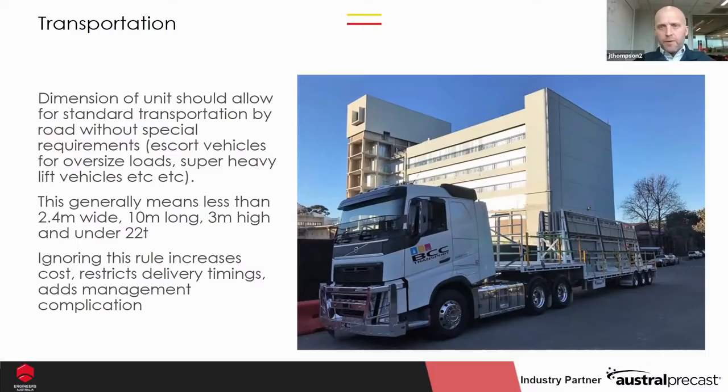The premium is to have something that can go in a standard load, and that means the width of the trailer, the length of the trailer, generally not greater than 3 meters high and under 22 tons. So you don't need escort vehicles, you don't need to do it in off-peak timings. It's just much, much simpler. And if it's simpler, it means it's cost-effective. Precast is really effective as long as you don't add cost to it. And it compares very favorably commercially if you don't do that.